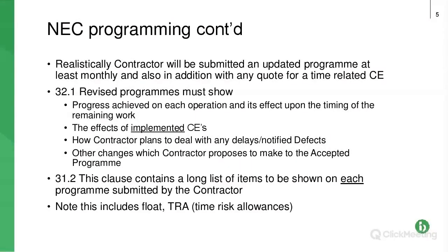Part 1, so the part that the paying party, the employer, has completed, or in the case of a subcontract, Part 1 is completed by the main contractor. So, realistically, when is the contractor going to be submitting an updated or revised programme? Well, I would say at least monthly. It might be twice monthly if the contract data says so.